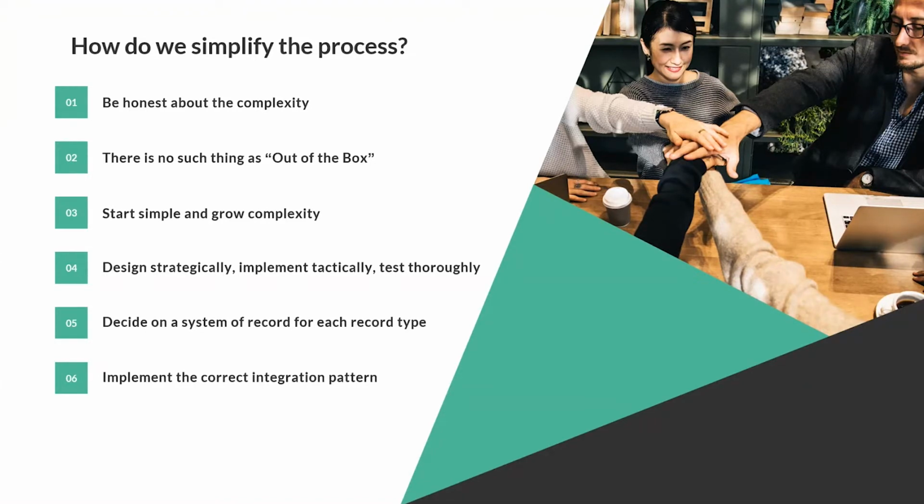Anytime possible, you should always try to define one system of record for each data type that you're trying to bring over. So which system is going to be the master for your inventory items? What system is going to be the master for your customers or contacts? Make sure you have that defined, so that whenever the integrations run and whenever the clients are testing, they really understand which direction the data should be flowing.